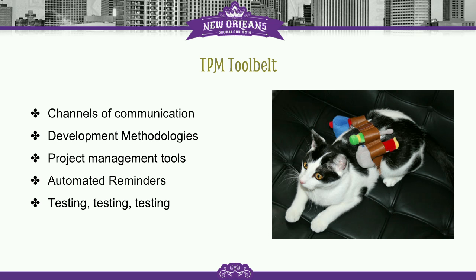The other thing that you need, we've talked a little bit about building out that kind of secondary brain. You may also want to put automated reminders in. When you send an email to your client and you say, I am going to follow up with you on this thing in 2 weeks, at the moment that you do that, set a reminder for yourself. You can use things like email tracking software, you can use Google Calendar, and what I try to do is have a specific block of time in the day where all of my reminders are going to start flooding in, and I just set aside time then, and my phone will start ringing, and I'm like, okay, 2 weeks ago I promised this, 8 days ago I promised this, and on and on, and you can just start banging it out, and your clients will think that you have the most amazing memory on earth. Surprise, you just use automated reminders.